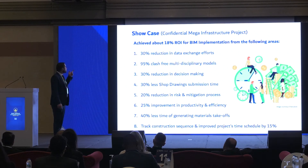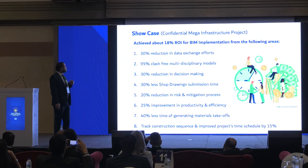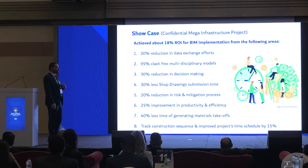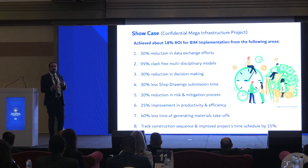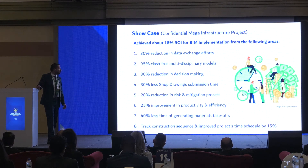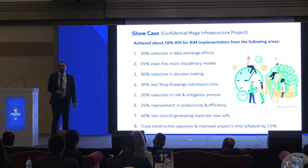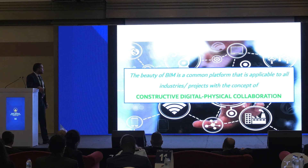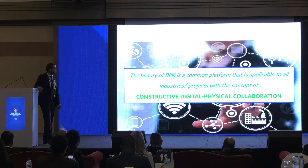One case study that I personally worked on showed an 18% return on investment for the BIM implementation. This 18% came from: 30% reduction in data exchange efforts, 95% clash-free multidisciplinary models, 30% reduction in decision making time, 30% less shop drawing submission time, 20% reduction in risk and the mitigation process, 25% improvement in efficiency and productivity, 40% less time generating materials takeoff, a clear track for the construction sequence, and improvement of the project time schedule by 15%. The beauty of BIM is that it is a common platform applicable to all industries and all projects, with a concept of constructive digital-physical collaboration.